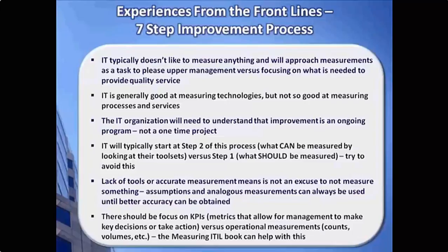Now, a KPI might be taking some additional measurements, like how many changes did I make that month, and how many changes did I actually implement with no defaults or errors. I can divide that number, so the number of changes that went in with no errors divided by all changes that went in, and now I have a change effectiveness ratio or change success ratio that I can now report to management. That now becomes a KPI, and picture how that might be used.